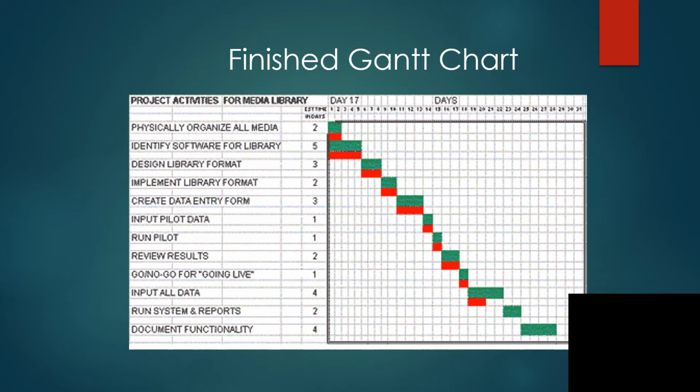Number three, create time periods across the top of your page that represent the appropriate periods of time. Number four, for each activity, indicate start and finish times by creating task bars and by highlighting across each row. Number five, assign milestones. Number six, share your Gantt chart with all key stakeholders. Ask for comments and if necessary, make revisions. Number seven, monitor your project and create project bars.